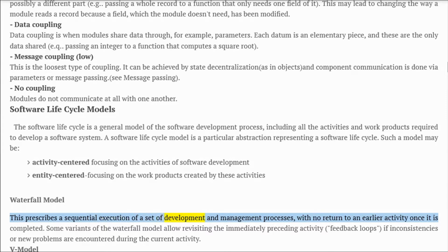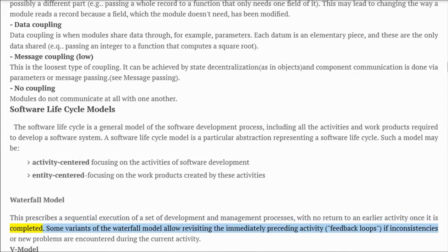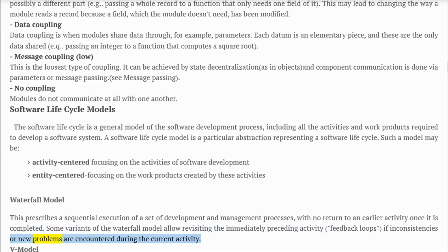Waterfall model: this prescribes a sequential execution of a set of development and management processes with no return to an earlier activity once it is completed. Some variants allow revisiting the immediately preceding activity via feedback loops if inconsistencies or new problems are encountered during the current activity.